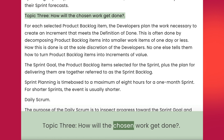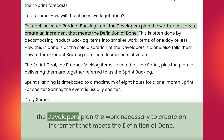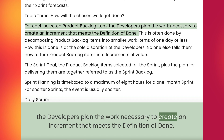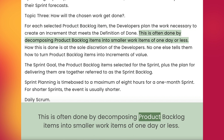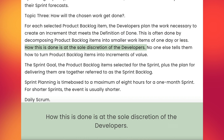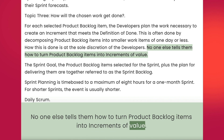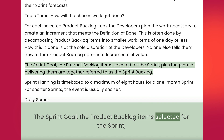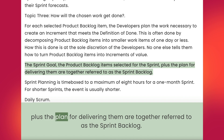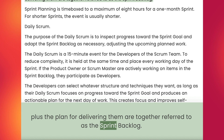Topic 3: How will the chosen work get done? For each selected product backlog item, the developers plan the work necessary to create an increment that meets the definition of done. This is often done by decomposing product backlog items into smaller work items of one day or less. How this is done is at the sole discretion of the developers. No one else tells them how to turn product backlog items into increments of value. The sprint goal, the product backlog items selected for the sprint, plus the plan for delivering them are together referred to as the sprint backlog.